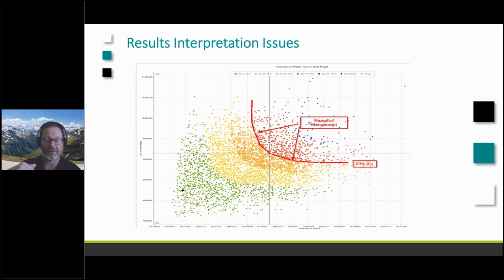But in between those, in the area where there's actually a curve, the project team can decide where they need to be. So this is really useful information to give a project team. They can trade off a little bit of money, spend a bit more money and accelerate the schedule, or they can choose to conserve the money and give back some time. So again, it helps the project team really understand what's going on.